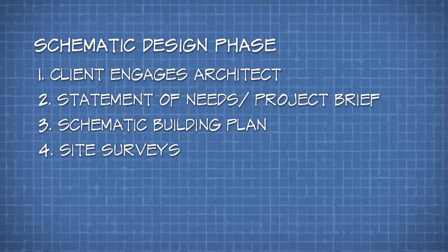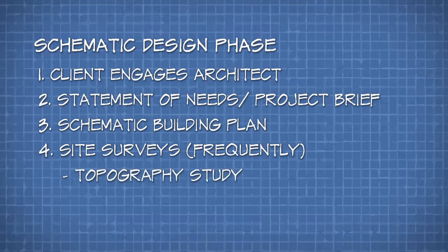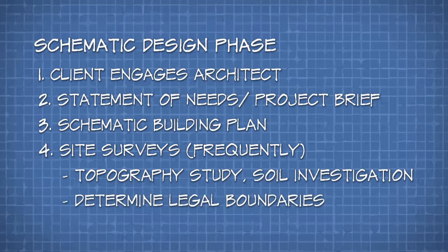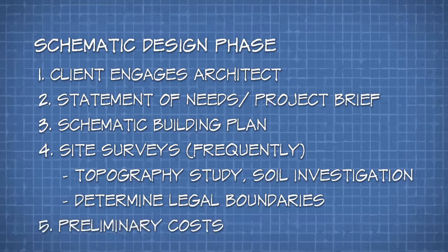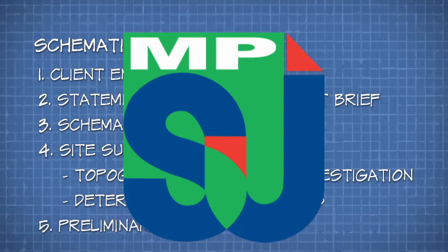Site surveys are conducted very frequently by the various consultants, including the architect, the quantity surveyor, and especially the land surveyor. The land surveyor does topography studies, soil investigation, and above all, lays out legal boundaries to avoid legal disputes. Preliminary costs are prepared by the quantity surveyor, and everything is starting to come together as a project in order to be submitted to the town council for approval.